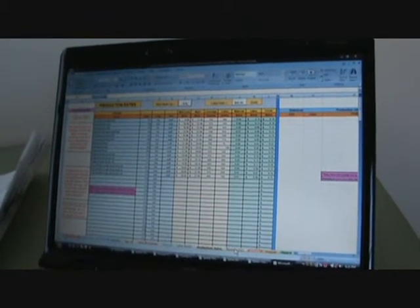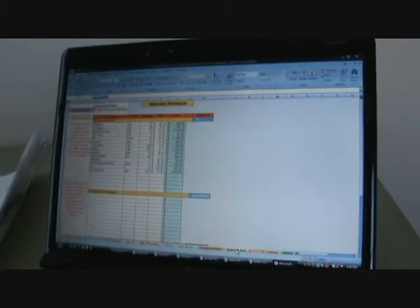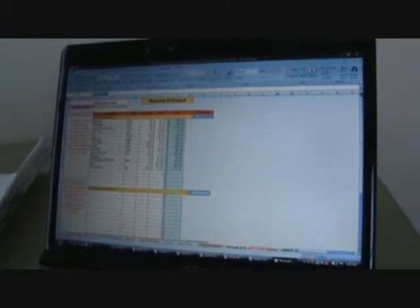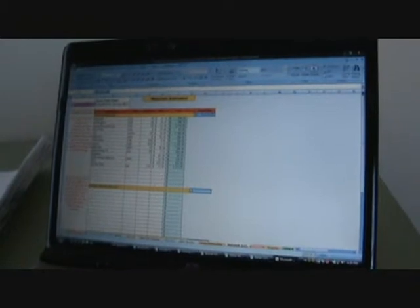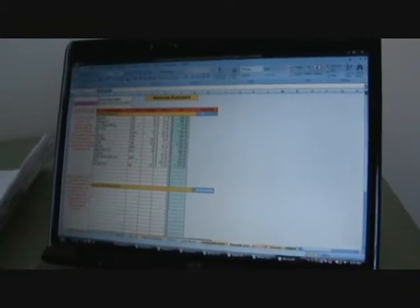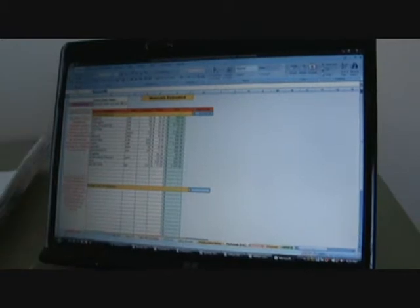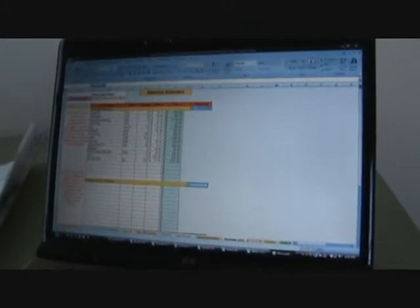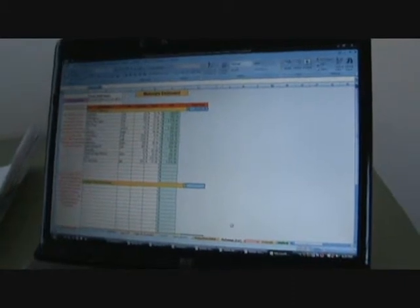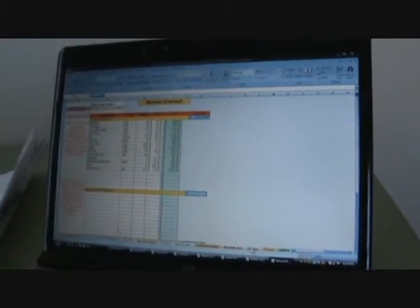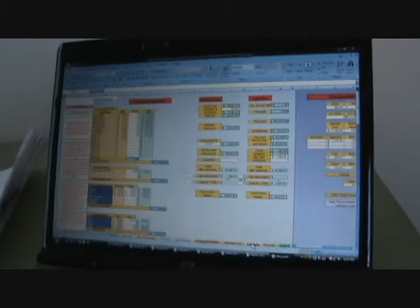So your next sheet here is materials. So these are all estimated. Now you're going to break out an estimated material sheet, and then an estimated labor sheet. So when you're figuring out an estimate, anything that's a material you put in here at cost, and then you mark it up on your estimate sheet. So any material goes in here, quantities and cost, and it'll carry over to your estimate sheet.